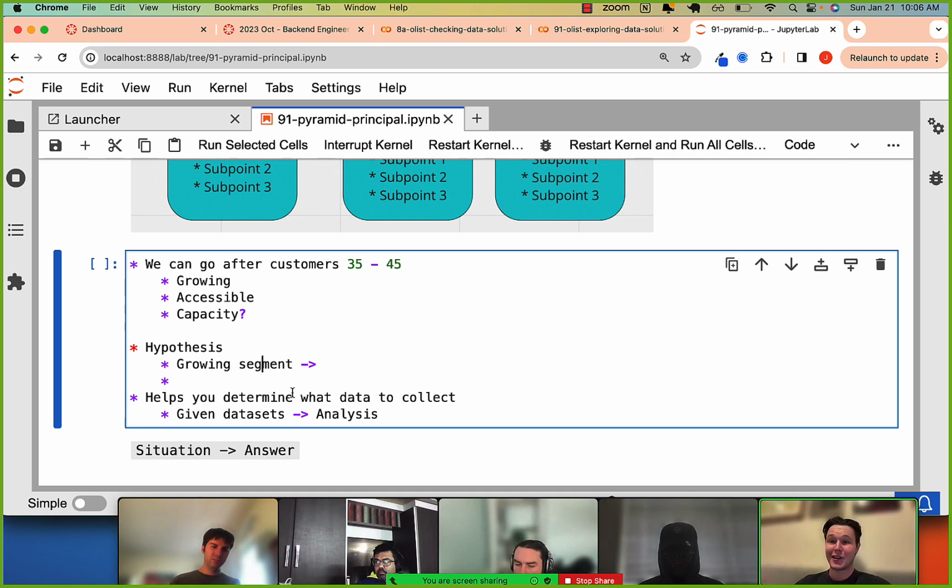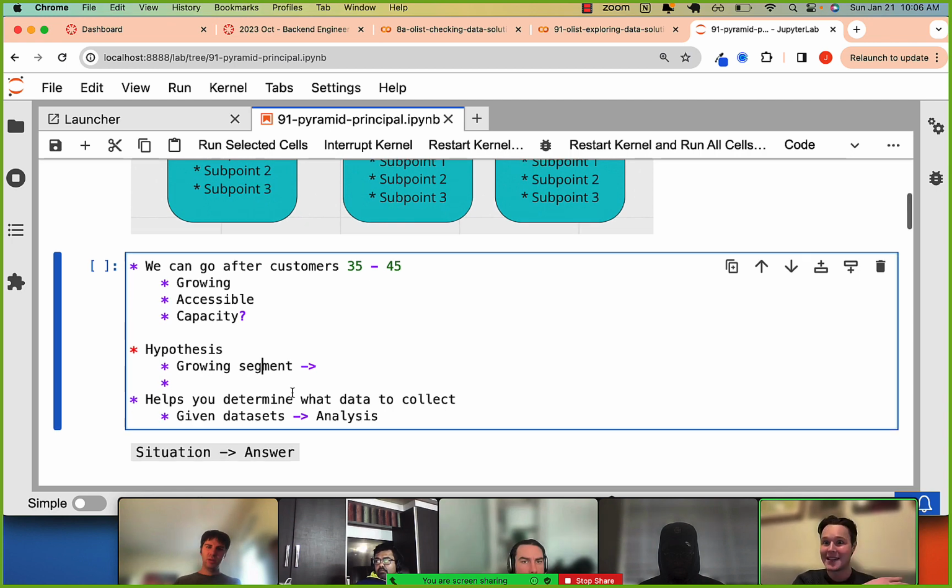It's also just a good way to show, if a piece of your hypothesis is that I've identified what we're missing, and there's going to be an extra step needed to collect this extra data, this extra analysis, it's a good way for your manager to have more transparency and insight into, okay, wait, I might need to add an extra day to their time for this.